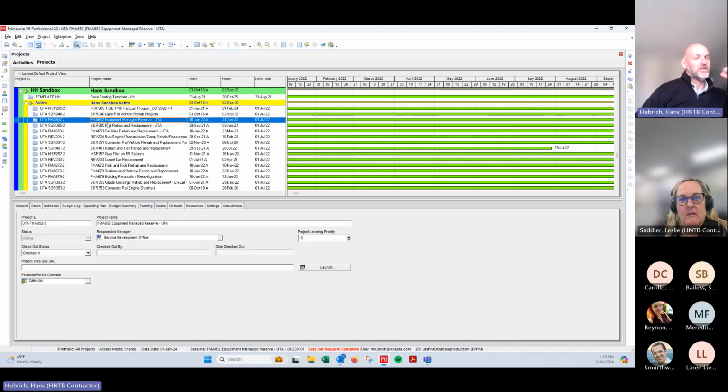And you can copy it and paste. You can delete the project up above that you messed up, copy this one, paste it back up above, and then you're good to go again. So in theory, as long as you're starting by copying your project, pasting it down below in your sandbox, you've always got the most current version somewhere living, even if you mess up above during your update.